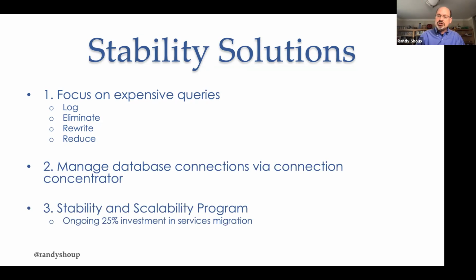And then we also initiated something that we called the Stability and Scalability Program, which is an ongoing 25% investment across the entire engineering organization in migrating from that shared monolithic database more to a services architecture, where the services own their own databases and own their own data in local databases. So that was the Stitchfix situation.